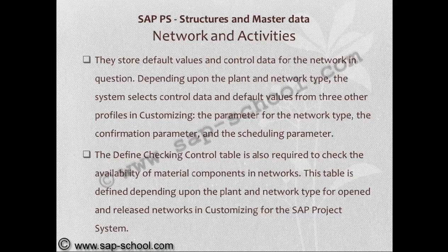The defined checking control table is also required to check the availability of material components in networks. This table is defined depending upon the plant and network type for open and released networks in customizing for the SAP project system.